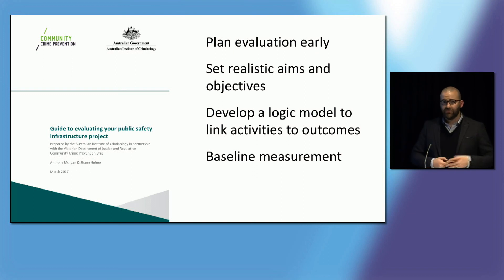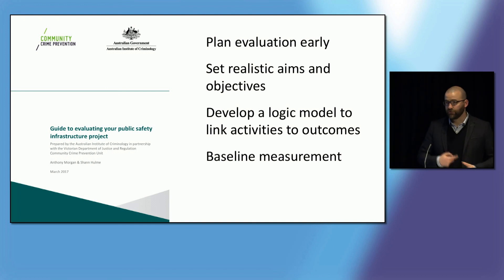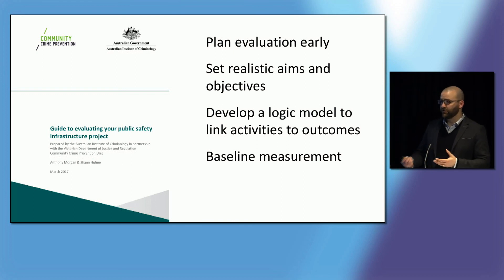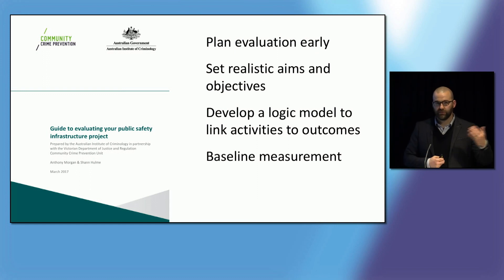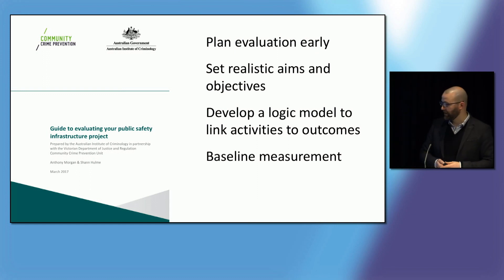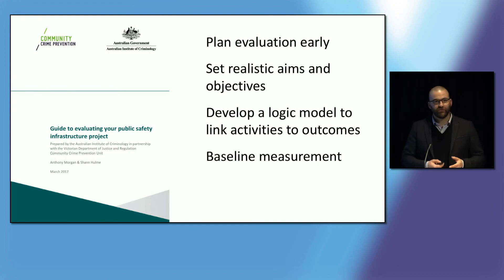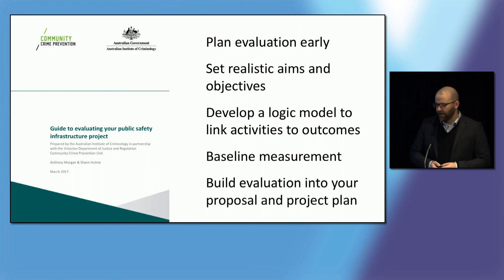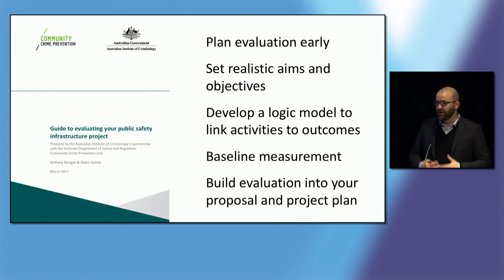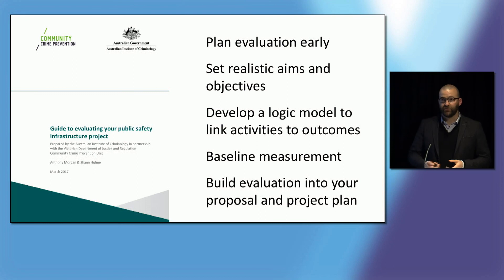Baseline measurement — as I said, CSA. If you're running a community survey, think about how you might repeat that for the purpose of evaluation. If you're doing any observational data, think about how you might collect that in a way that can be repeated objectively and systematically over time. Think about what your baseline is — what are you going to compare against in one or two years when your project is finished? And finally, building evaluation into your proposal and project plan. Evaluation is actually a really important project management activity and does require resourcing and some level of time and investment, so building that into your overall proposal is certainly really important.